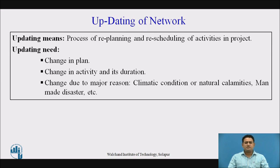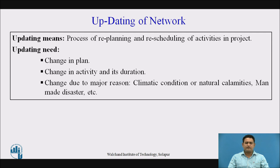Manmade disasters may be due to improper planning of equipment or tools, or due to lack of safety on site, which may cause an accident and a delay in the project. Because of that, we have to go again for updating — whether the scheduled activity is on track or not, and if there is a need to replan or reschedule the activity.